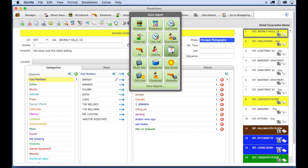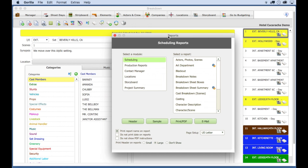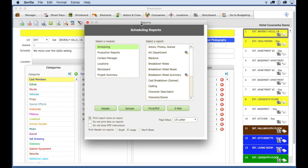Here, you can print the strip board, a call sheet, a shooting schedule, a day out of days report. And if you want to access all the reports for Gorilla Scheduling, click on the more reports button.